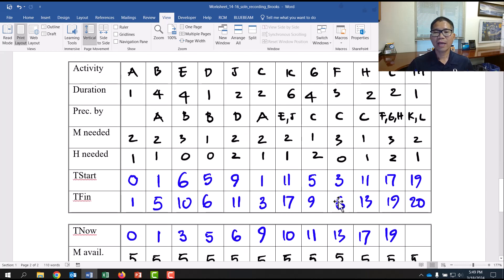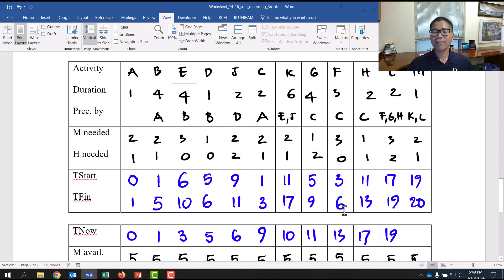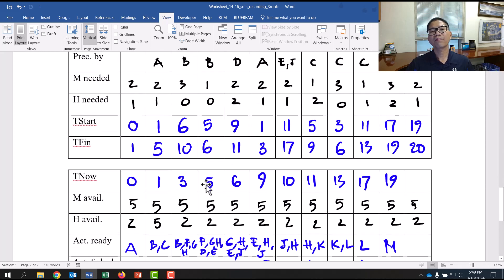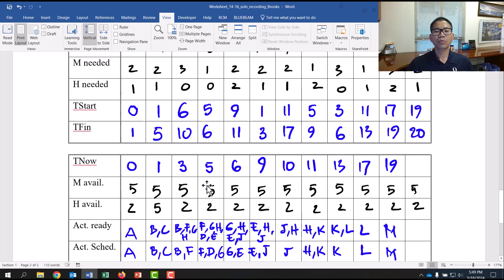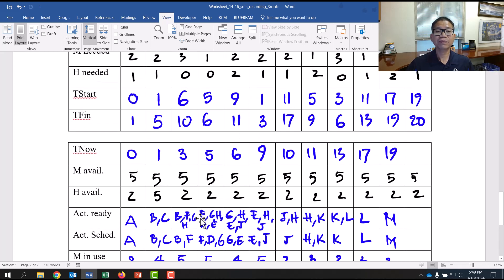Now B and F are in progress. B finishes at 5, F finishes at 6. Take the minimum: time now = 5. At day 5, B finishes. F is still in progress. G and H remain ready from before.